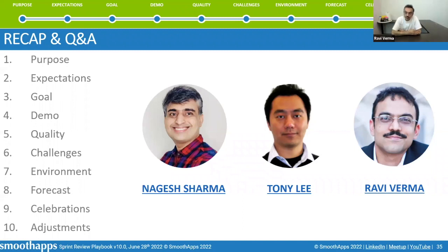So in the sprint, ideally, even in sprint planning or backlog refinement, create the story, the journey of a human being who is getting stuck at some point right now. And what is your vision about how their journey will be different? So in terms of preparation, start perhaps even in backlog refinement or sprint planning. What will be true at sprint review that is not true right now? So create the arc of the story. So that's preparation number one.